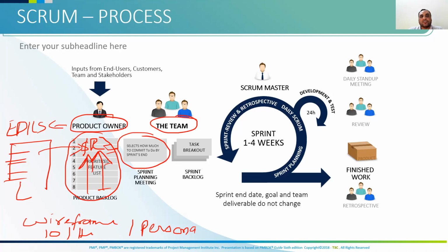In the sprint planning or iteration meeting, we say it is time-boxed. In that planning meeting, every team will have their own planning meeting, and multiple teams can work concurrently. In every planning meeting, they will take some user stories, then decompose the user stories into tasks, and then they will estimate.